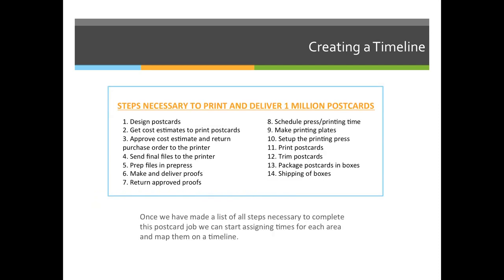Since it's a postcard printing project, we can make a list of all necessary steps. We must design the postcards, get cost estimates to print them — which might take 2 or 3 days depending on where we send the quotes. Then someone has to approve the cost estimates, and we return a purchase order to the printer. Once everything's finalized, we send files to the printer so they can prep them. If something is wrong — like not packaging the InDesign project correctly — they may send them back, which adds lost time to the process.